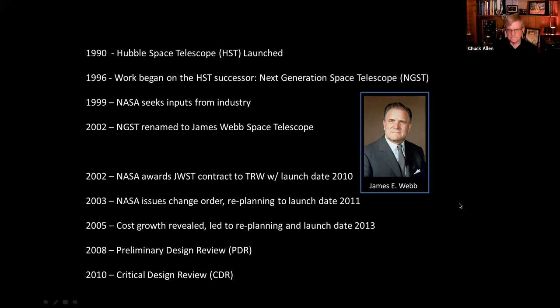Alrighty. So in 96, NASA invited the European Space Agency to cooperate with them. And as a result of that, they formed a task force to start working on the initial design and areas that the Europeans can support the telescope, which then was called the Next Generation Space Telescope, NGST. In May of 1999, NASA went out to industry to help seek solutions for the Next Generation Space Telescope. Two $12 million contracts were awarded for different competing designs that was almost like a pre-design stage.